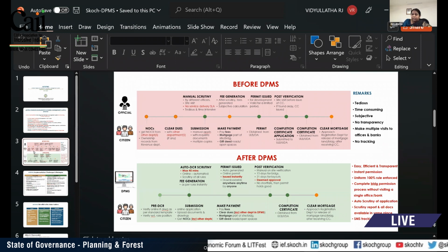Immediately, the applicant can correct the error and can upload it. If everything is right, the fee generation challan will be generated. If the fee and the required documents are submitted, permission proceedings will be generated automatically. From that minute onwards, the applicant is allowed to go ahead with the construction. After obtaining the permission, the technical staff visits the site within 15 days and observes that if any misrepresentation is there, as per the act, we are taking action on the permissions.